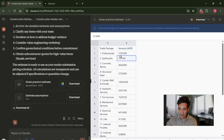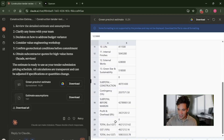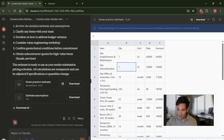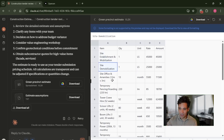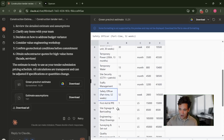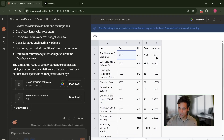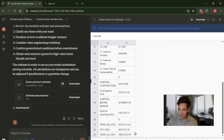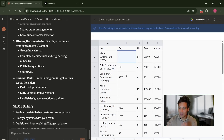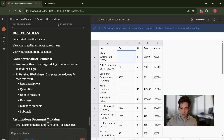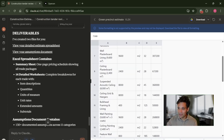It's got a summary tab where I can look at the value of each of the packages — preliminaries, earthworks, concrete, and so on — profit and overhead, subtotal before margins, broken down into a pricing schedule. Then it's prepared a tab for each of the amounts built up in that. For preliminaries, I can see it's made up of site establishment and mobilization, demobilization, site offices, temporary fencing, tower crane hire, safety officer, and first aid and PPE. For earthworks, it's used site clearing and grubbing at 3,000 square meters at $4.50 to give a cost. All the costs are completely broken down. It's come up with a total price of $50 million including GST, or $46 million excluding. I can review this, tell it to make corrections, go back and forward and get it to fix items.